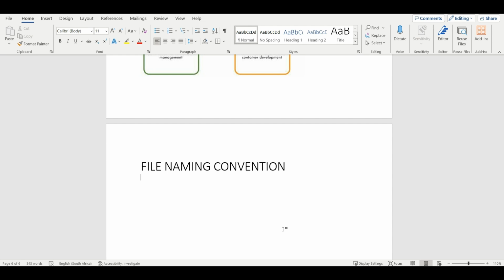So typical examples are the project, the organization, volumes and systems, levels, location, file types, roles, and also the number. And also you can add the purpose of your documentation, purpose of issue, the revision, the classification, and so on. So for our purpose, let me just place it in a table format.